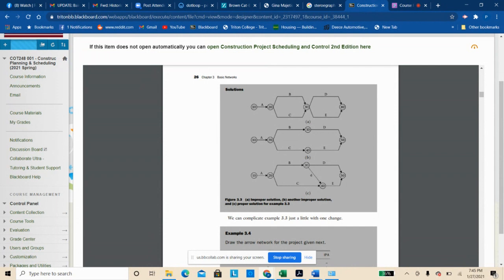Those are different. You think you're talking about a different thing, but again, there's no way to differentiate because both B and C are still just going from 20 to 30. There's no way to differentiate between B and C in that case. Same thing with D and E. You're going from node 30 to node 40 again. No way to differentiate those 2. Then you go to the next one, same answer you got there.